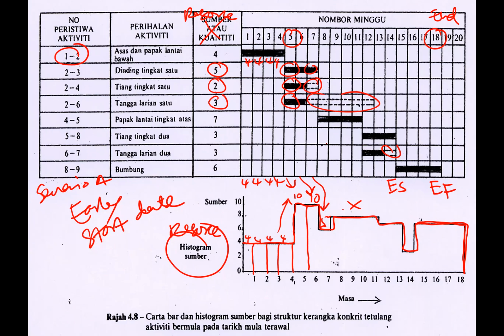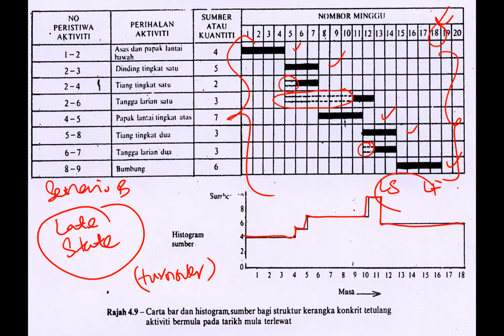we normally do utilize the early start date and early finish date, and then late start date and late finish date, and sometimes we can even use in between. What do I mean by in between? You notice this activity does have 6 weeks of total float. Meaning to say, if we push this activity to the late start, we already maximize the utilization of that activity in terms of timing. We can basically start in between. Instead of starting early like this, we can start on week number 6, week number 7, or week number 8, or week number 9. You see, that's what I call starting in between.